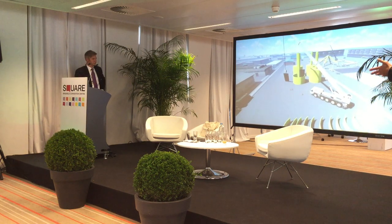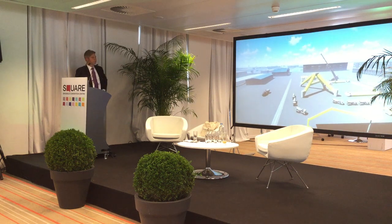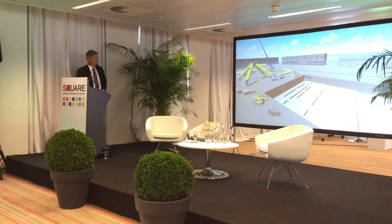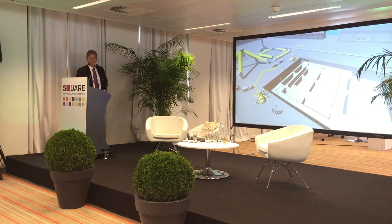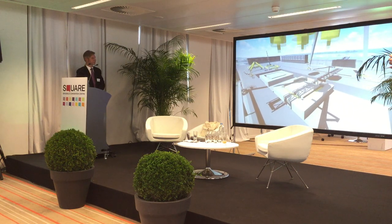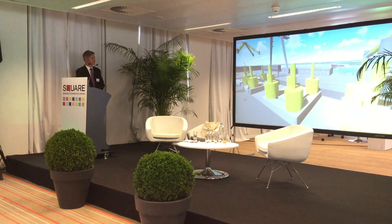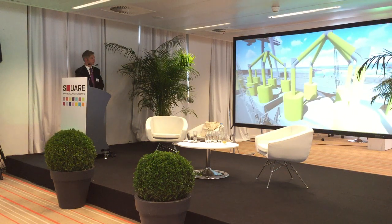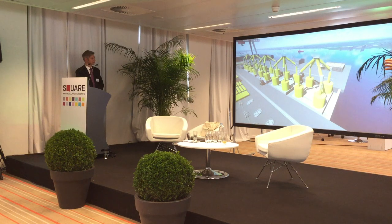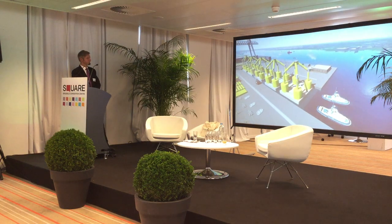You can see the size compared to the people. We are able to bear a wind turbine of 6 megawatt or higher rated power. We are assembling parts of the structure and having here the so-called gravity anchor, which has some hollow parts inside, which will be ballasted later with seawater. We build our structure itself on top, and we are showing one example in the dry dock with a serial production. Then we are equipping that with ladders and staircases and so on, and towing the entire structure out of the dry dock, so we can start with the next series of five, depending on the dry dock.